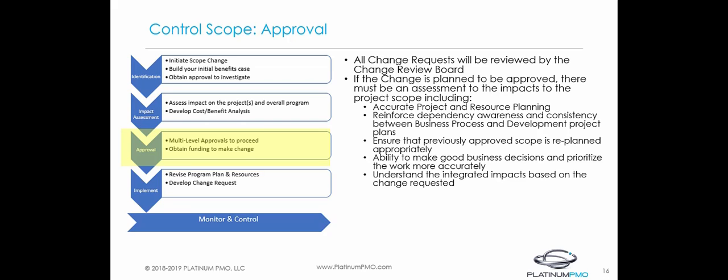As part of their analysis, they will do an assessment of the accuracy of the estimates, the number of integration impacts associated to the change, the current state of the program, are they behind or ahead of schedule, the available capacity across the changes to take on the additional work, as well as the reserve funds available to pay for the additional work. When they factor these and whatever other factors or standards have been established by the governance board,